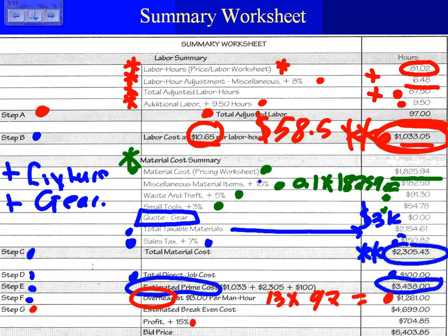Okay, so this becomes 0.15, multiply this by your prime cost, estimated cost, which is 4,699. That will get you close to $700 overhead after you pay all your electricians, after you pay the people in the office, the insurance, everything. You're going to make $700 that goes to your account as an owner of a company on this job. You can do two things with the overhead. You can feed them back into the business, as you know, Chris, or you can take them and go to Hawaii.